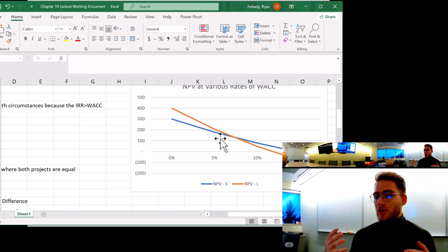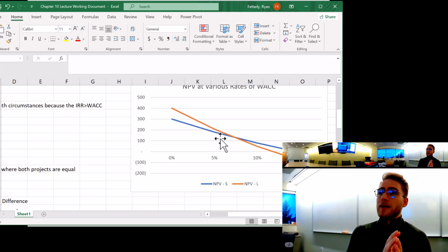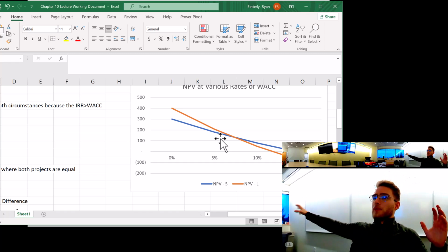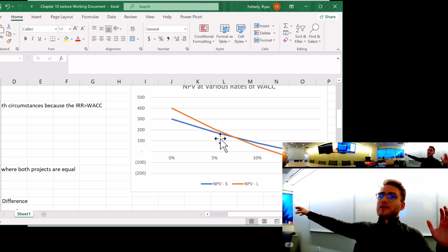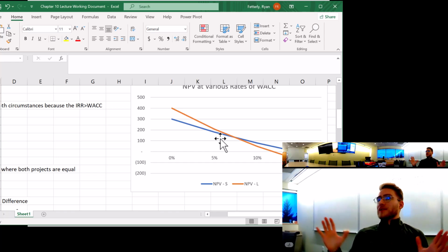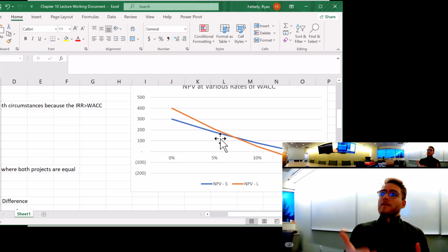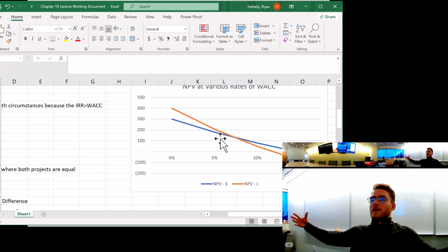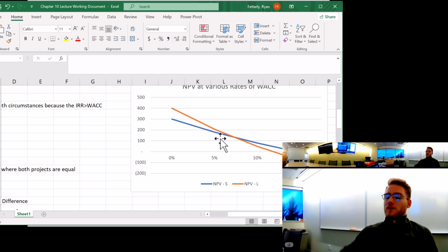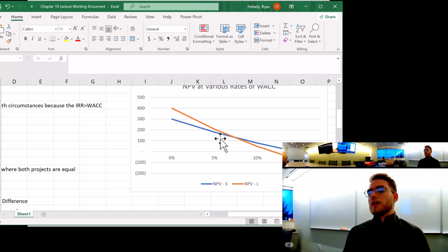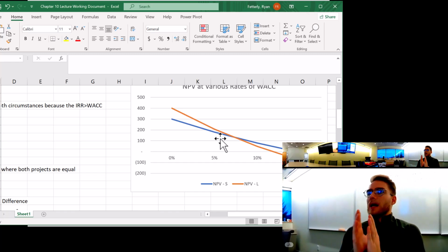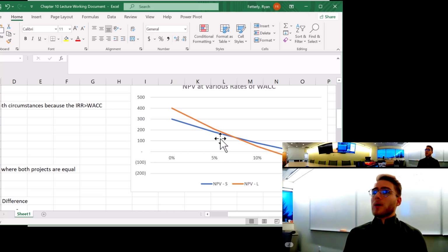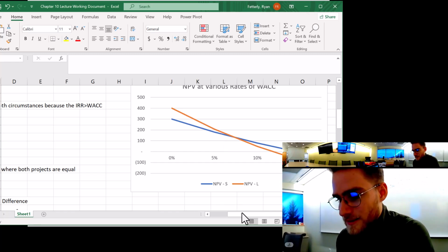But if you choose a smaller discount rate, right, you're going to favor the big projects with big long-term cash flows, and you may shy away from projects that are shorter, that have decent initial cash flows, but overall don't have the volume of cash flows that the bigger projects have, right? So you have to understand, at that crossover rate, that's your decision point, and that's where your decision would change when you're selecting projects. And that's why it's important.